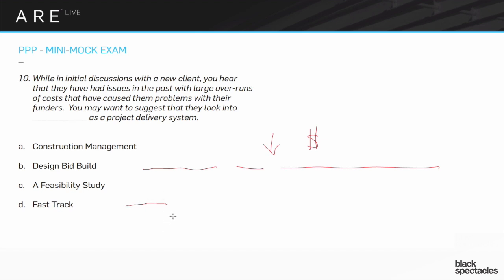In that case, what you're doing is the architects are providing a package that is, let's say, all about the foundation, and then while they finish that, they hand that over, and the contractors start building the foundation. And then while that's happening, the architect is now doing, let's say, the steel structural system, and they finish that package, and they hand that over to contractors, and the contractors start building that right away. And then they hand over the shell and all of the other things, the sort of basic floor plans and everything that fit into this as a system, and then they hand that over, and that starts getting built right away.